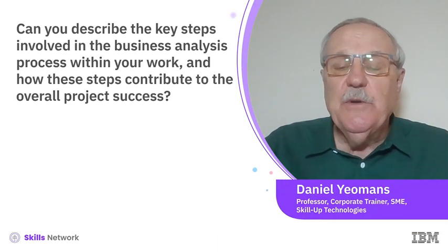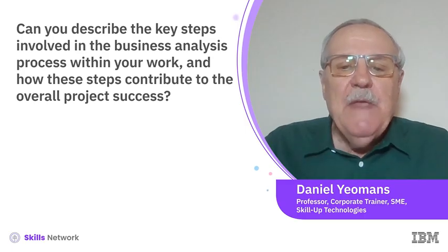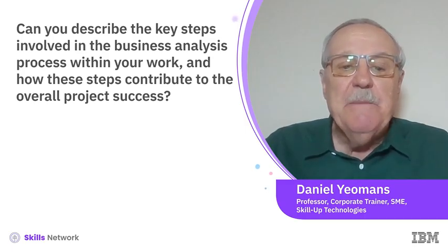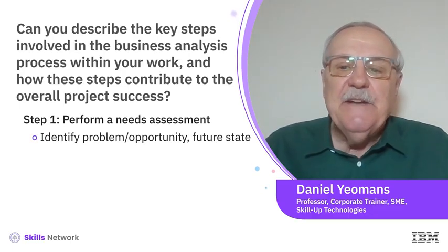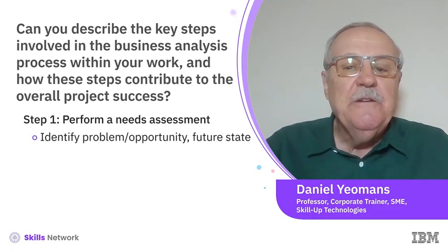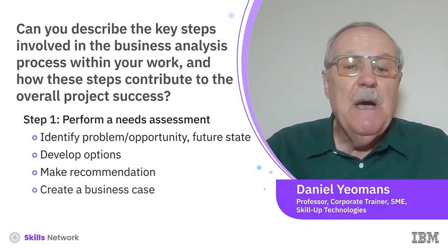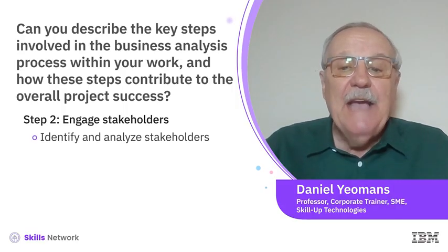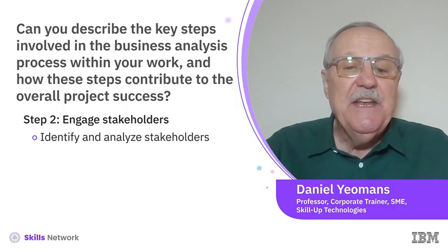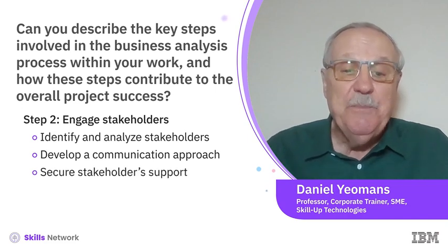I generally follow a step-by-step approach that was adopted by the Project Management Institute that parallels processes shared in the Business Analysis Body of Knowledge, or BABOK. Step number 1, perform a needs assessment. Identify the problem or opportunity, current and future states, develop options, make a recommendation, and develop a business case. Step 2, engage stakeholders. Identify stakeholders, analyze stakeholders, develop a communications approach, and gain their commitment and support.